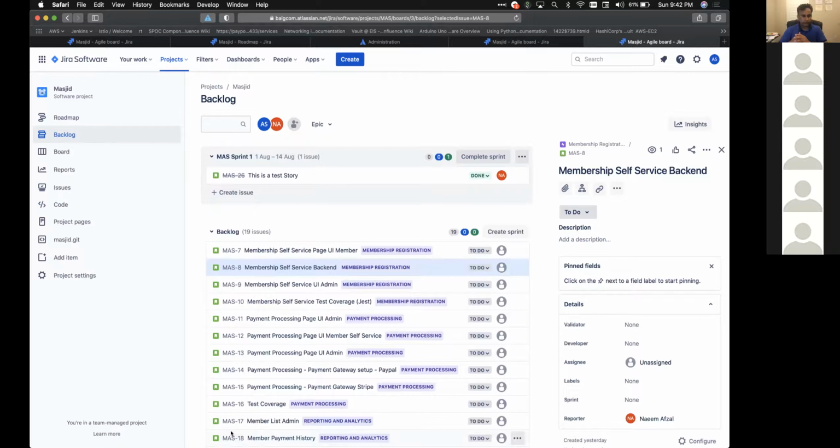Like, we do not deliver front end before delivering backend. If there is a backend and front end is not present, it won't break the system. The backend will be there, but it will not be accessed at any given time. Only after front end is introduced, it will start communicating with such backend. I think that has to be managed through scheduling of our action items. Scheduling and the dependency stuff, right? Dependency management. That's right.